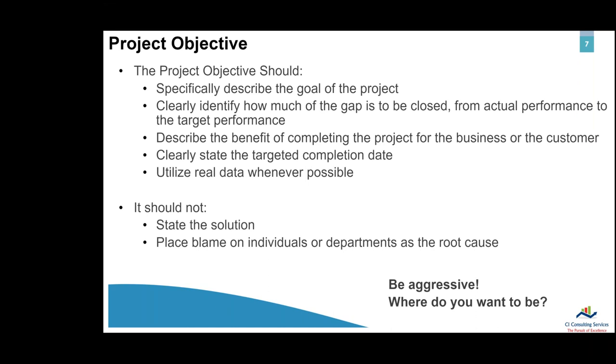Obviously, speaking of which, a problem statement and objective are living documents, if you will, whether or not they're part of any project charter or A3 or anything else, and they can and should change as new facts come to light, as processes change. So what shouldn't a project objective do? Well, it should never state the solution or place blame on individuals.